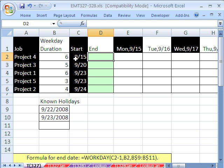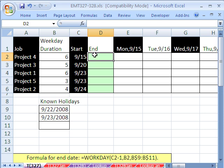Here's the start date. Our project is six days. But our end date needs to also add extra days when there is a Saturday, a Sunday, or a holiday. So we're going to start first create our end date using the workday function, which delivers a serial number date given a number of days and holidays, and it will add Saturdays and Sundays.